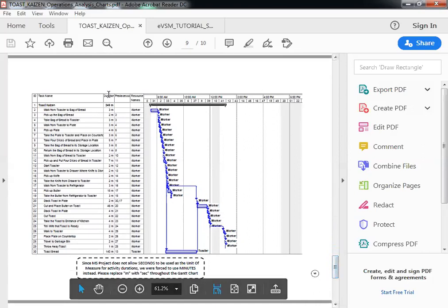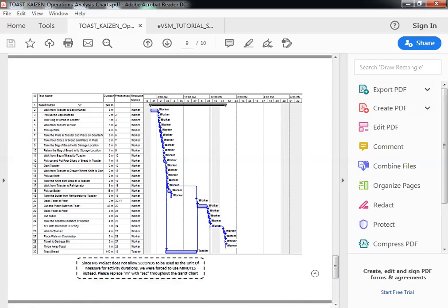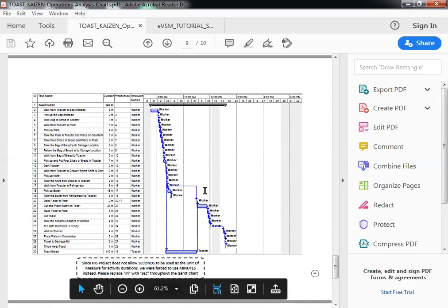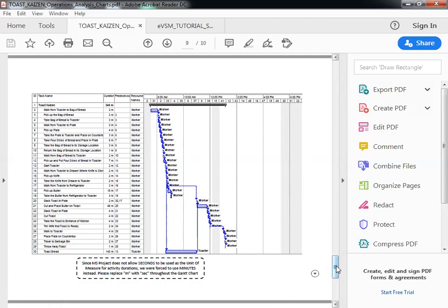So, we use Microsoft Project, and again, Project is not exactly a scheduling tool, but all we try to do here was, there are 30 steps. You put a start and a finish time for each step, a duration for each step, okay? And then you put a precedence, meaning that this activity can be done before that activity, and then the software basically creates this project Gantt chart. I don't think it's very helpful. It almost looks like, in this case, you are just documenting the process.